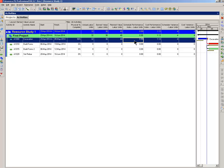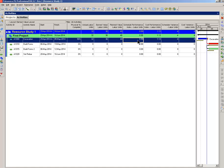First one, schedule performance index, SPI. This one, you take the earned value, 36 divided by the plan value, that's 40, gives you 0.9. 0.9 meaning that we are behind schedule. But 0.9 is not too bad. Anything below one is behind schedule, anything above one is ahead.